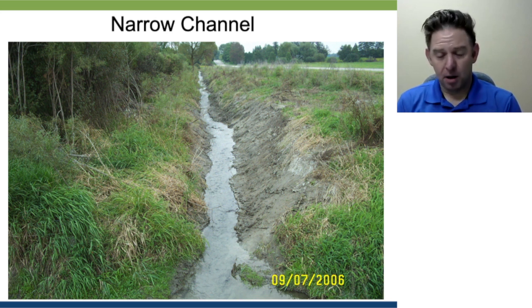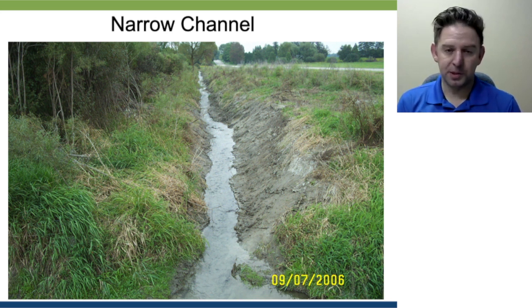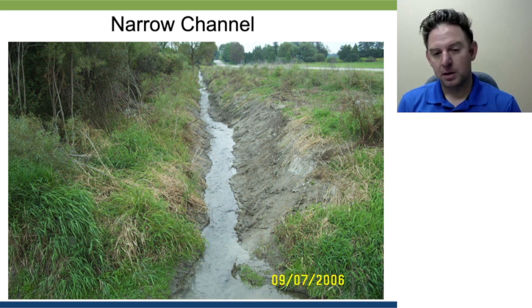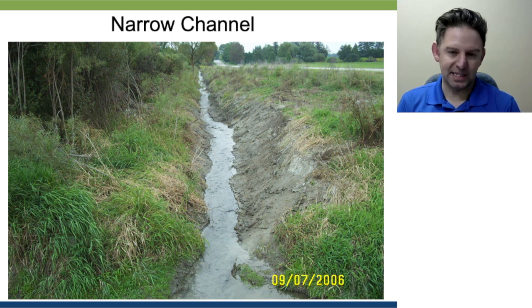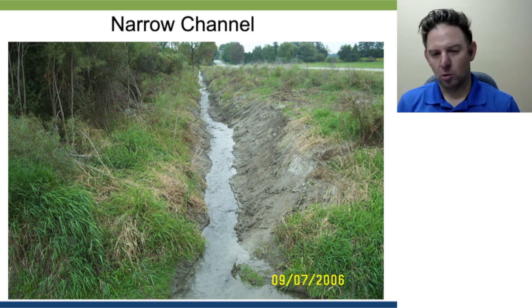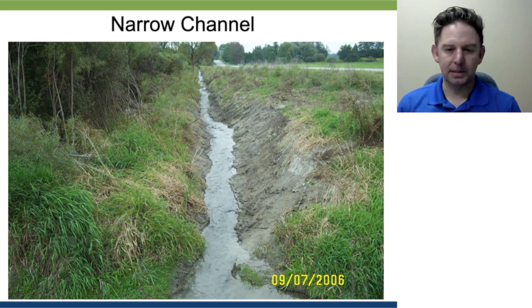The first part was actually, by all intents and purposes, a very narrow channel. They cleaned out as little as they thought they could. But with a little tweaking, they found they were able to actually get an even narrower scoop going upstream. And that was important for this one here because this was a Class D drain. So it was cold water with brook trout in it. So I had to look at as many ways as possible of getting through the approval processes and the lowest amount of impact.